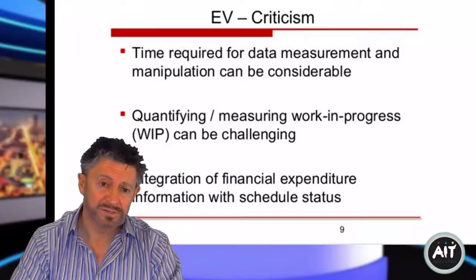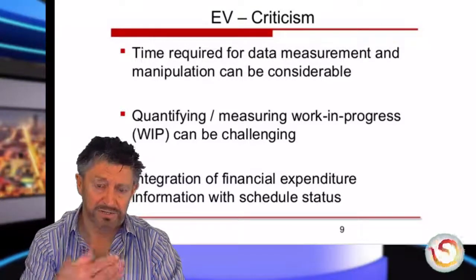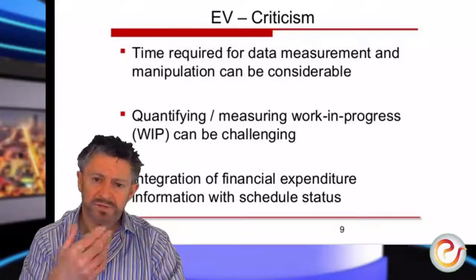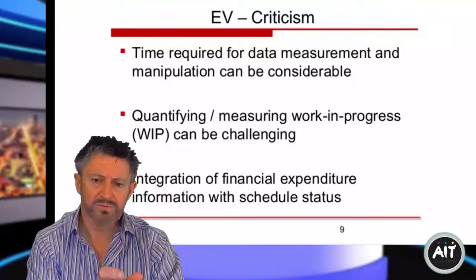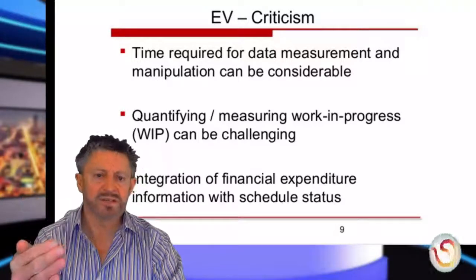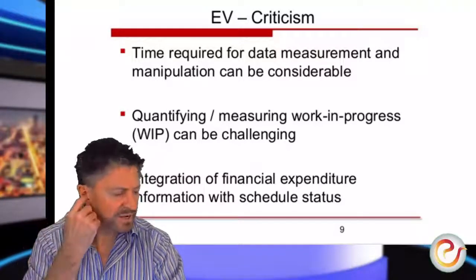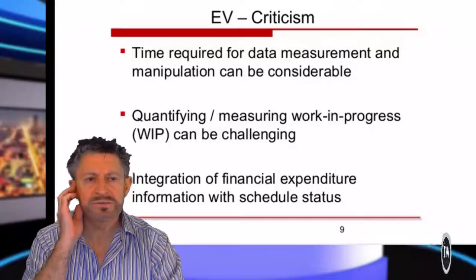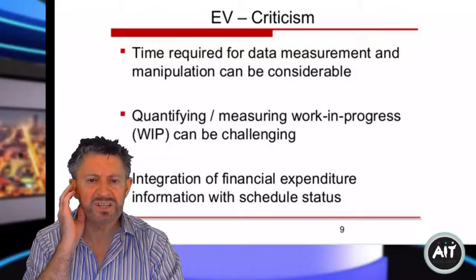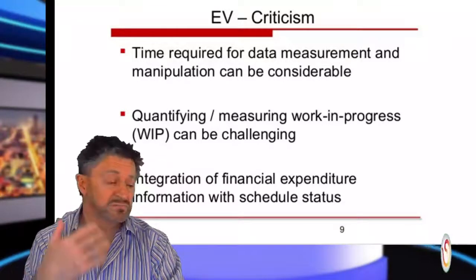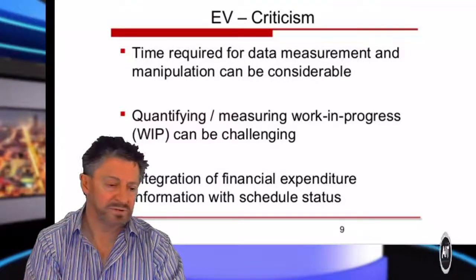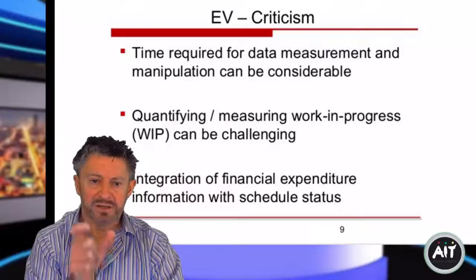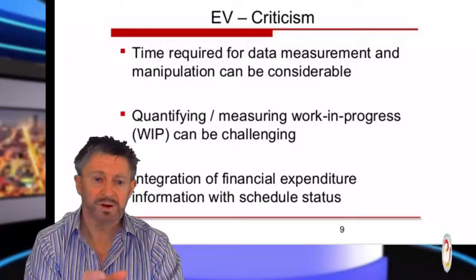So in terms of their salary, then you can say, how much is it costing me to have Mark working on my project per hour? So divide his salary by, I think the average is around 1,600 hours is your allocation for the year. So you have 52 weeks, we say 48 weeks working, divide that into his salary, and therefore you can get his cost per hour of having Mark.